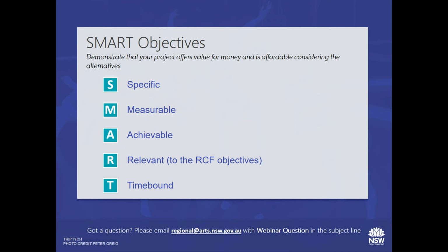You might want to allow some contingency in here because of periods like Christmas, which can be quite disruptive, and other things like end of financial year is also quite a busy time. So just be mindful of that.